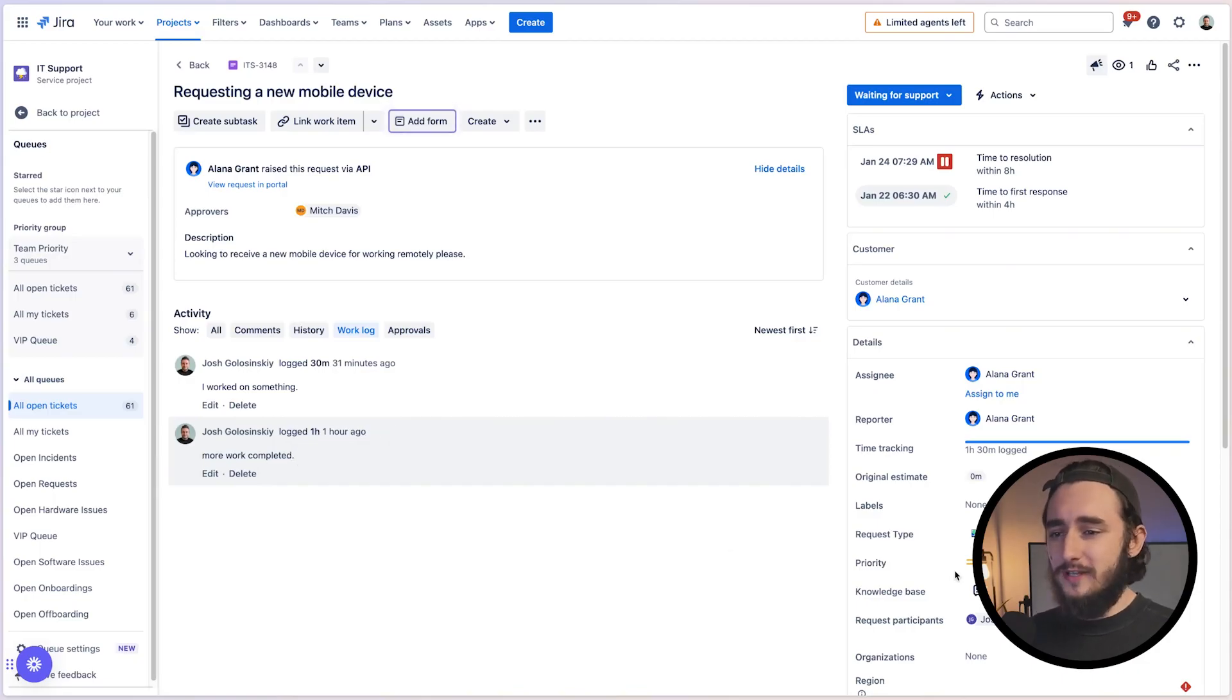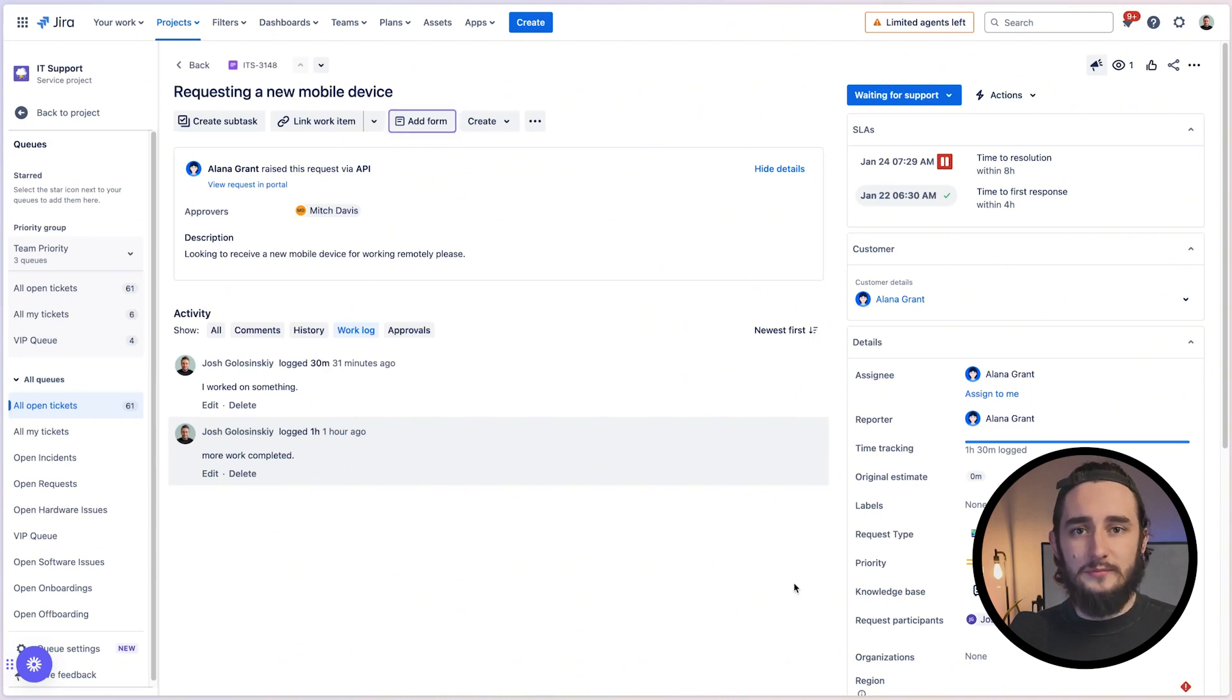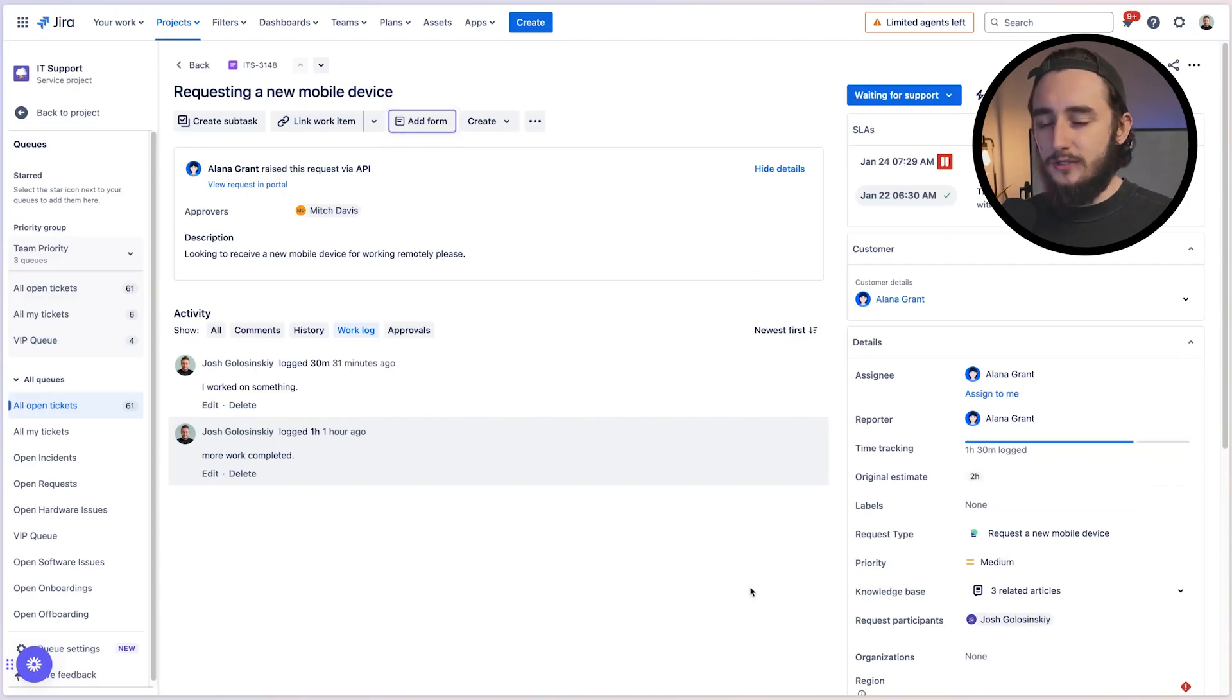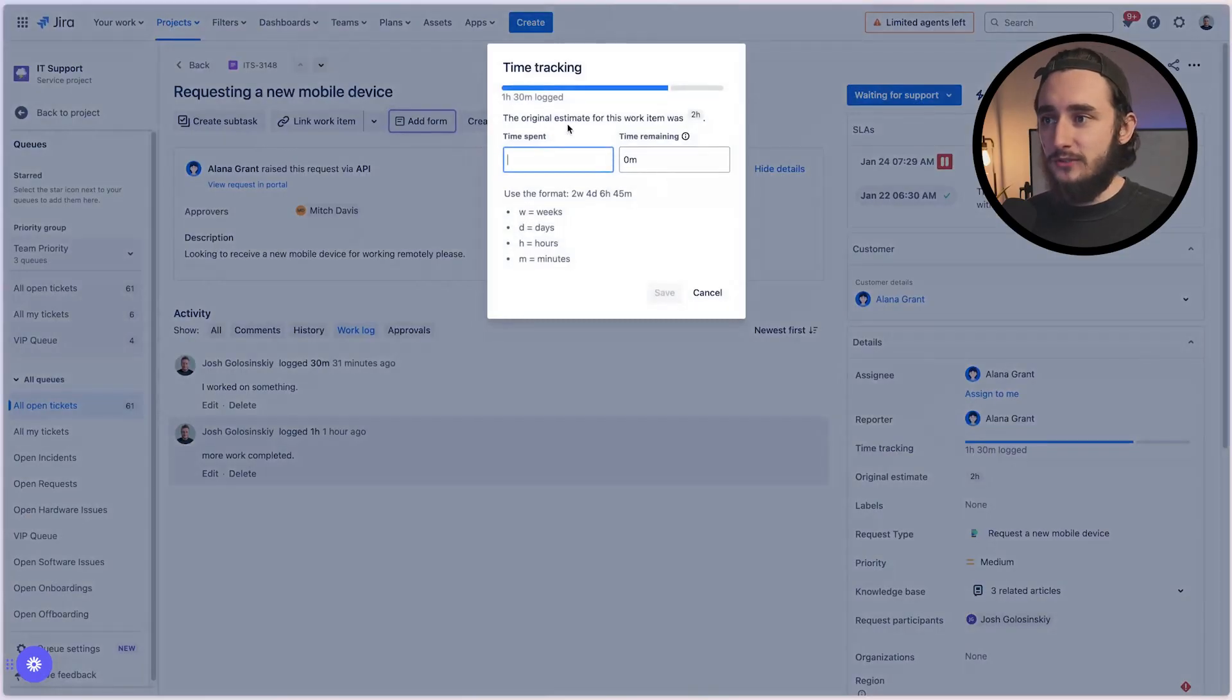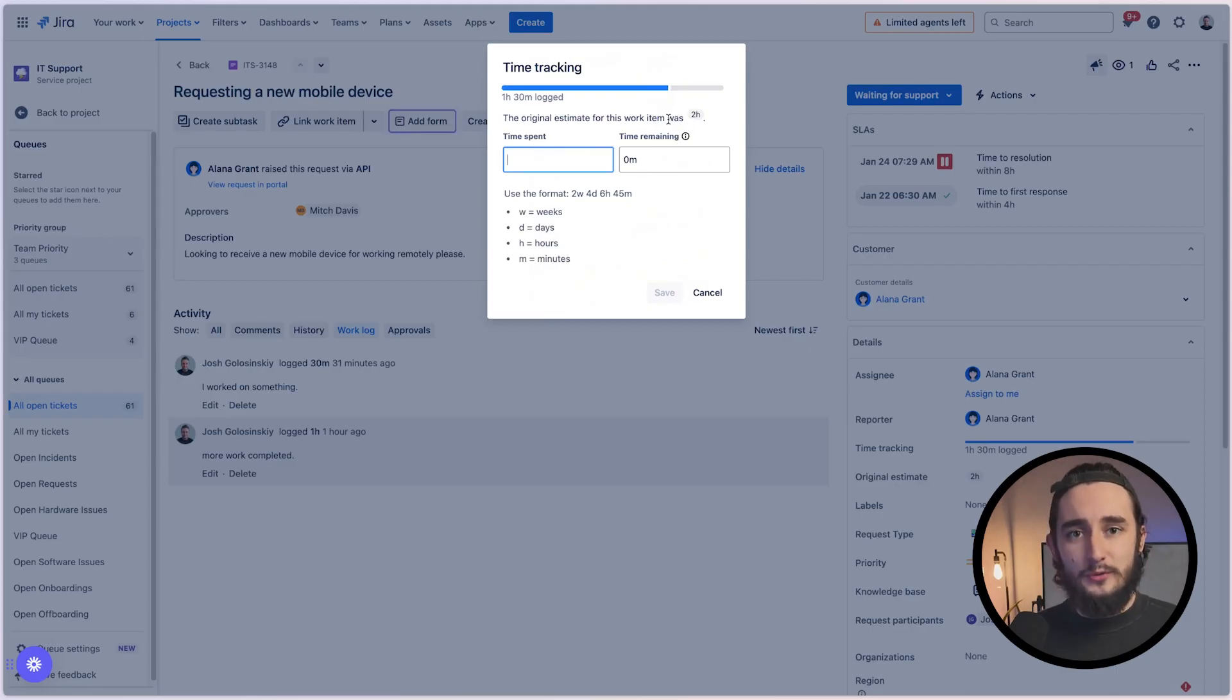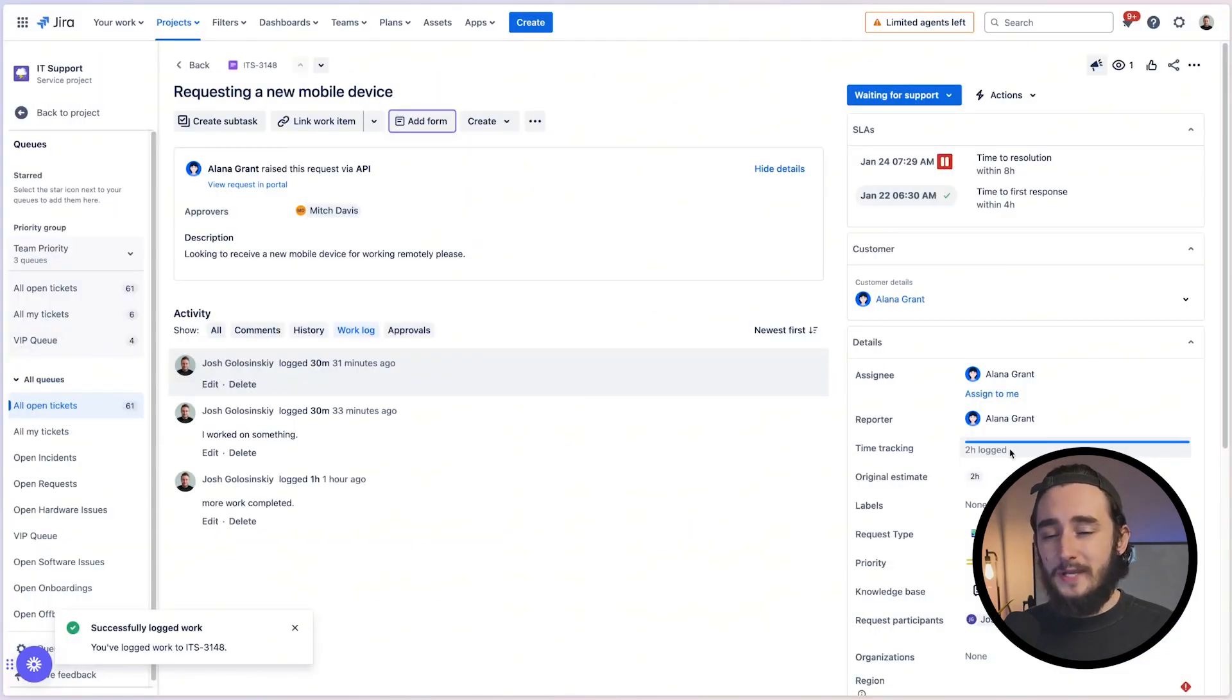So what about this original estimate field? Why is this useful and why do I suggest using it? At our company, we have a lot of projects that we work on and a lot of tasks that are created for individuals to complete. And sometimes when those tasks are created, we want to know, or we want to add an estimate of how much time it would take to complete those items. So that's what the original estimate field does. Let me add a value here of two hours, click check. And now the original estimate is set to two hours. And you can see that this little bar here changed from completely blue to partially blue and partially gray. And the reason this happened is because we actually logged one hour and 30 minutes, but the estimate was two hours. So let's say that you have a total amount of time that you want allocated to this ticket or project. You could set that in the original estimate. That way you communicate to your users how much time this should take. Now we'll go ahead and log the last 30 minutes, click save. Now our two hours is logged and we have no more time remaining.